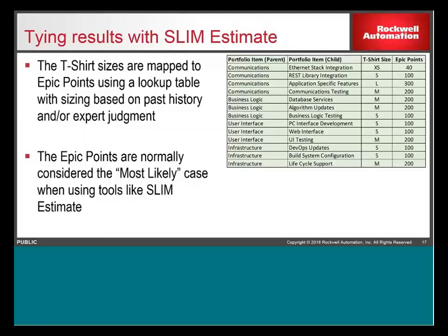The example I used earlier is that someone who is a subject matter expert may say it's only going to take a certain amount of time, but the people actually doing the work will need more time. Either it's because they don't have enough domain experience, or there might be other things that come up. For example, it's a brand new set of development tools that the team hasn't used before. It could be any number of complexities.